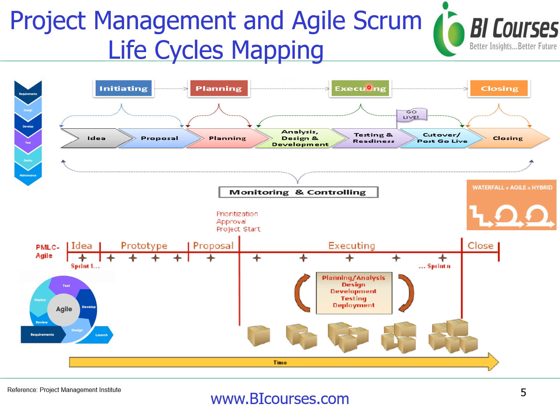Next, execution. This phase basically translates the design into actual code. In this phase, you will see detailed design, development, coding, testing, deployment/release. All these activities from the IT development waterfall methodologies happen here. Whereas in agile methodologies, all activities from requirements to the launch, everything happens in this execution phase.